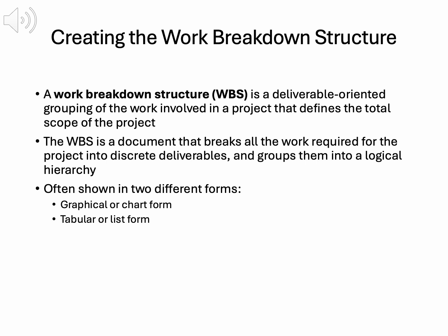It ensures all deliverables are included, preventing scope creep. For the training project, the WBS ensures all course development tasks are planned, from research to delivery. Creating a WBS requires team collaboration to decide how to organize work and how many levels to include. Focus on deliverables, not activities, as activities belong in the schedule.